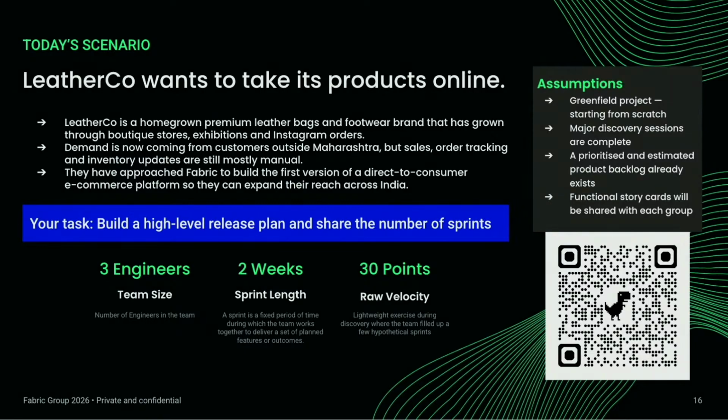So account management is usually not a part of MVP in things that are not very critical. Obviously in banking and all, it's a different thing. But for this use case, you might not even need an account. Yeah, I think MVP is something that we did not think about.